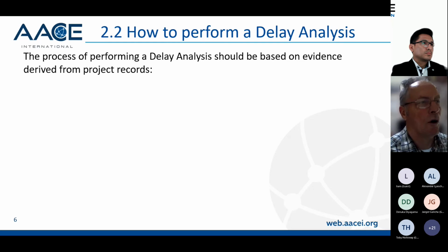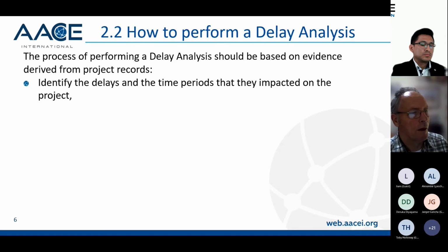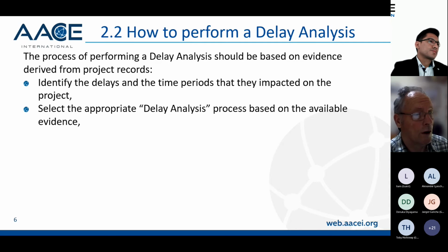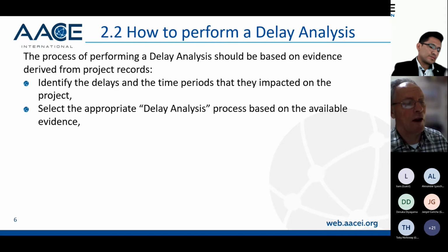If you've got a road or a railway, then maybe you take photographs or videos at the end of each week or something. So first of all, you've got to identify the delay and the time period that they impacted on the project, and this must be recorded. You must then select the appropriate delay analysis process based on available data.